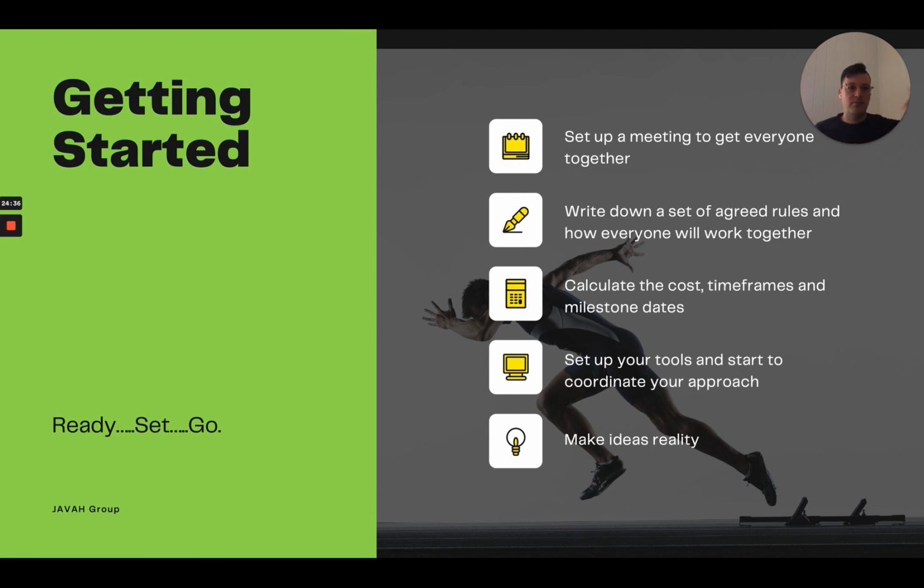Maybe it's at the end of every sprint, maybe it's every couple of sprints, maybe you're going to work on a specific user type, and once that specific user type is complete, you're then going to pass it over. Or maybe it's a particular product, and once that product is finished, and maybe that'll be multiple sprints, you're going to hand that over. Or if it's Kanban, maybe once you get to so much value being delivered, that's going to be your milestone date. And every time you hit that value target, that's going to be your key milestone or your trigger to push that off.